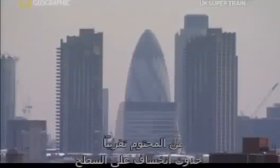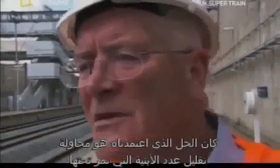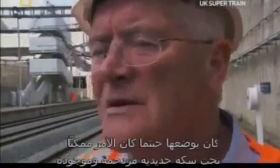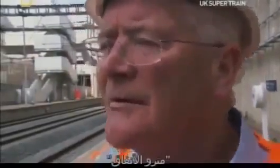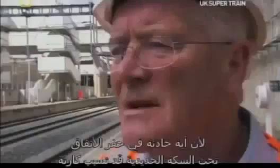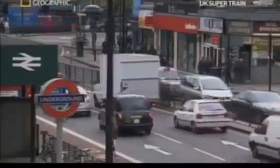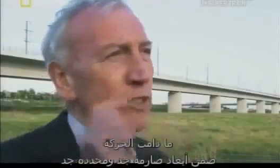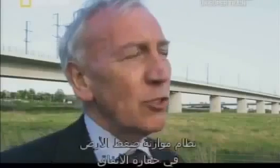Digging a railway under a metropolis gives architecture the jitters. When you excavate a hole in the ground, it's almost inevitable that you'll get settlement at the surface. The solution we adopted to try and reduce the number of buildings we went under was to put it wherever possible under an existing busy live railway. That brought its own issues because any mishaps in the tunnelling under the railway could have been disastrous. And we had agreed with the underground that we would only tunnel as long as the movements were within very, very strict and limited dimensions.